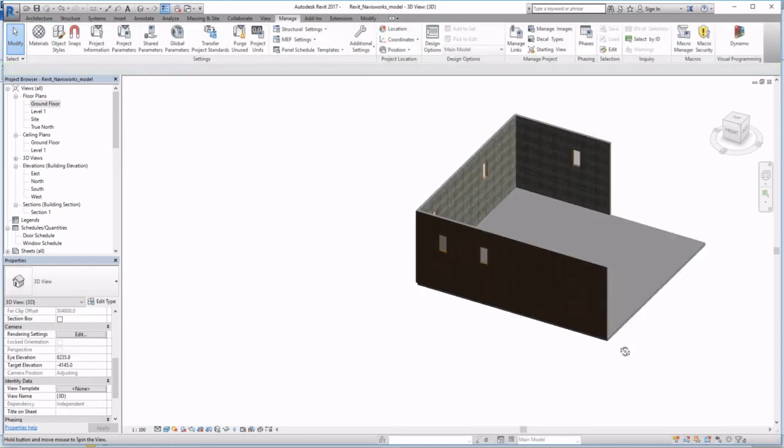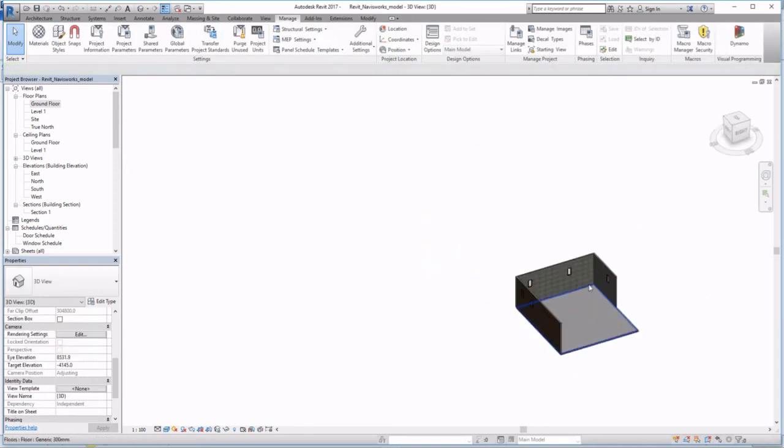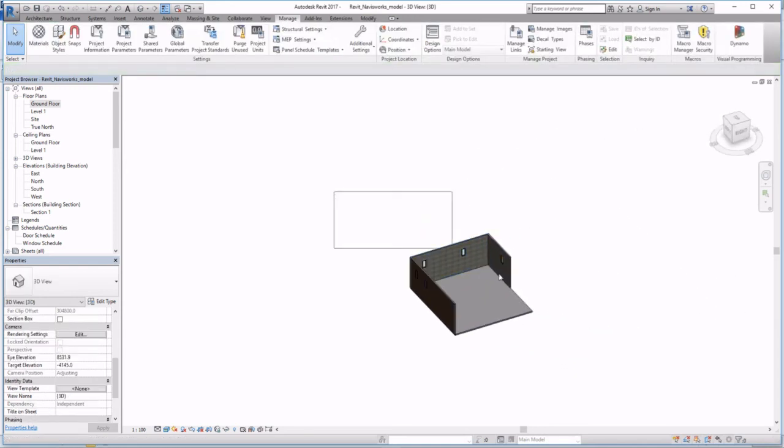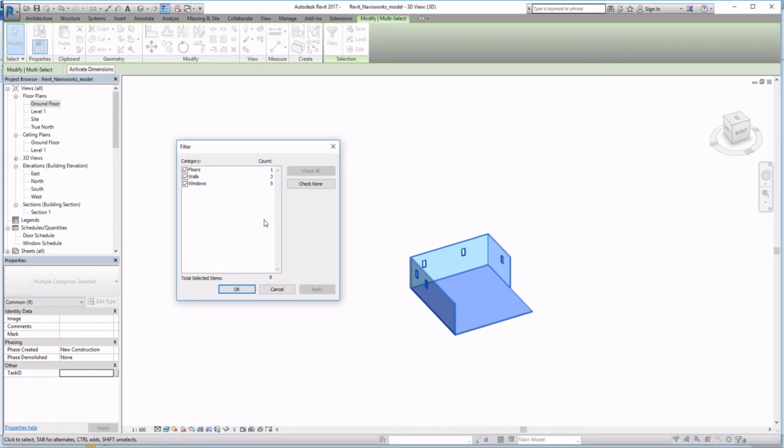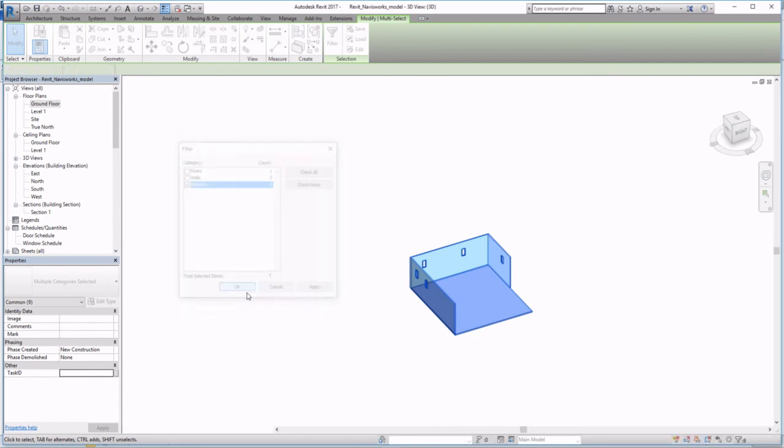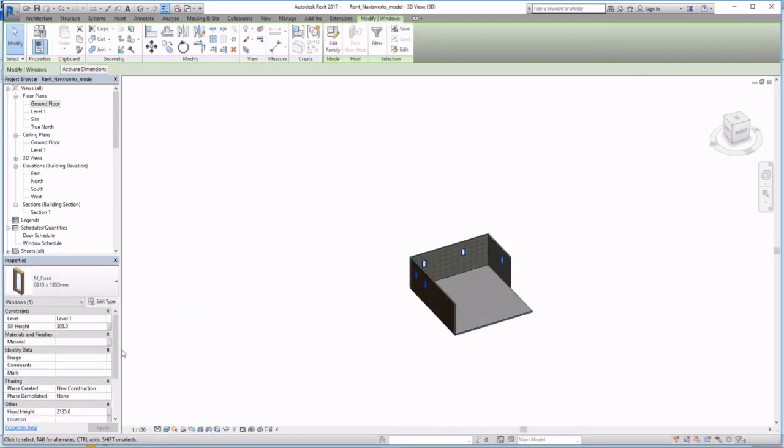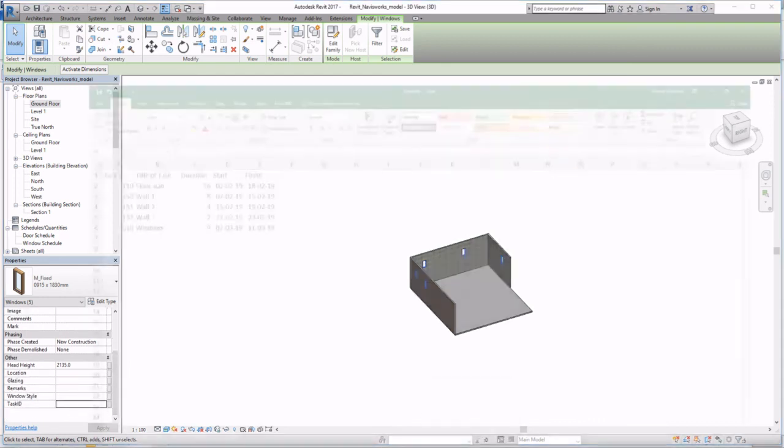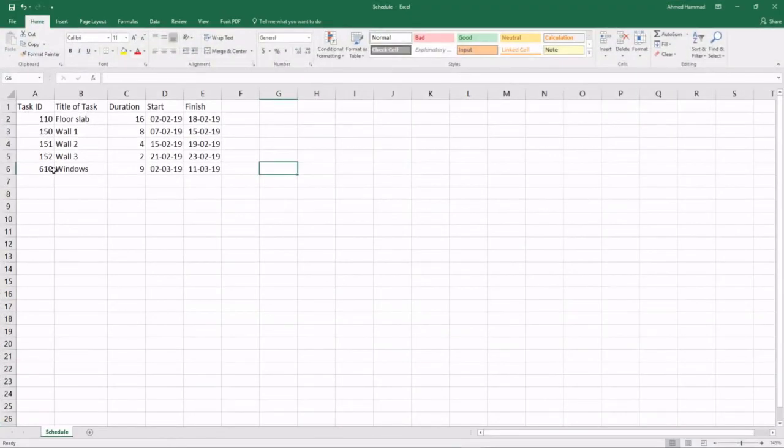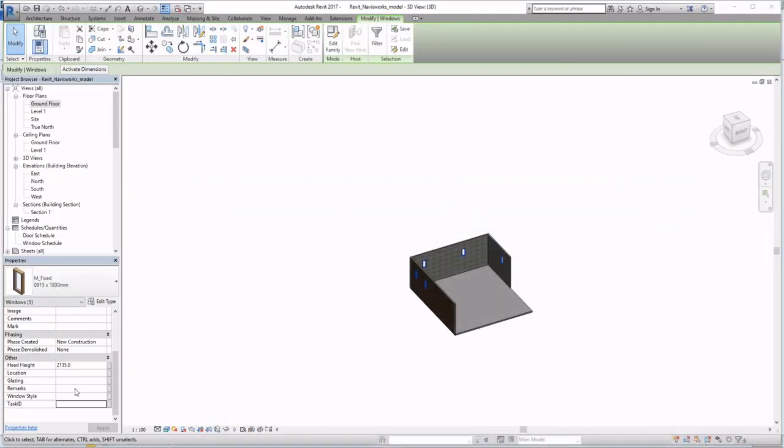Now I want to select my windows just like I showed you last week. Filter, check none, and then select your windows. Now that they're all highlighted, you can add a Task ID associated with all windows, 610.